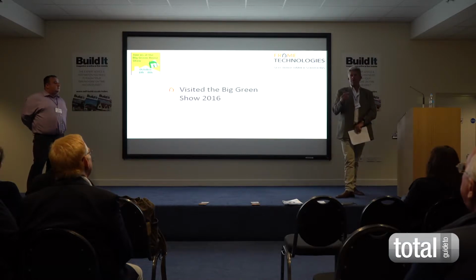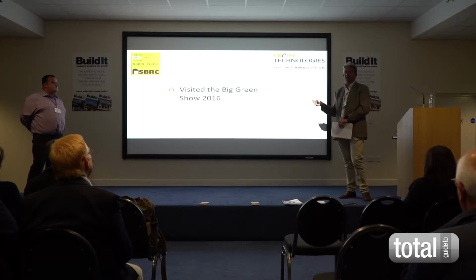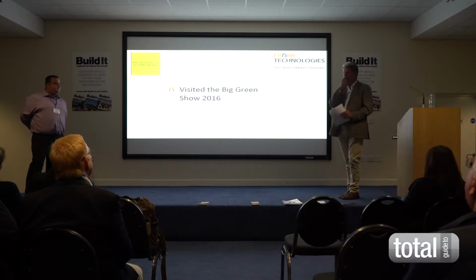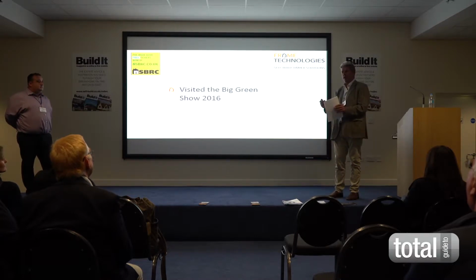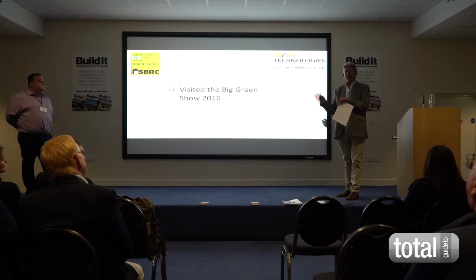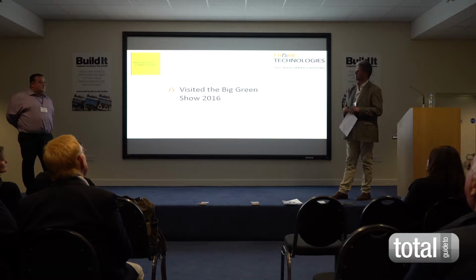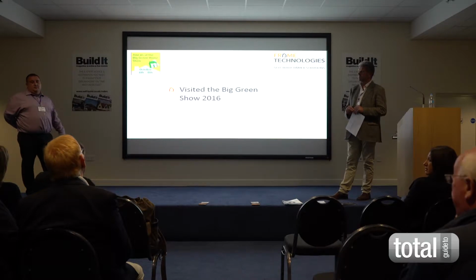Yeah. Whereas traditionally with timber frame, it's been a case of getting planning permission, getting detailed planning, getting your architect to do the building regs and everything, and then passing it across to the timber frame company, or the build system, to build it. And then it's at that point they say, well, can't we move this? Can't we move that? If you'd done this, if you'd done that. One of the key things Martin was trying to do was reduce the amount of overlaps. One of the things we did for you was completely cover that process off, didn't we? Yeah, and for someone who hasn't done it before or doesn't really know the ins and outs of all the laws and everything, it's pretty good to have everything under one roof, so to speak.